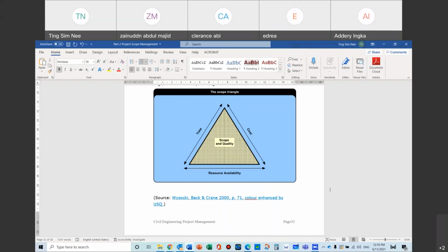And then you're done. You pick option A or option B or option C, it doesn't matter. It can be only 2 options. Or you can skip entirely if there are no options at all. You basically are done even up to the second stage. If there is really no option, you have to build a 2-lane bridge, then that's it. You don't have to have separate option studies here. But normally we will also have option studies. So some people will combine these two together and do option studies.